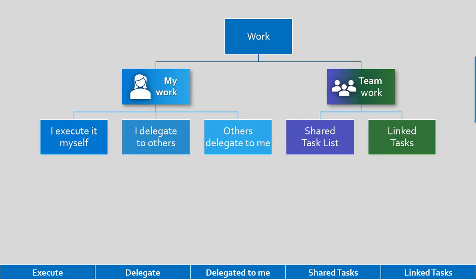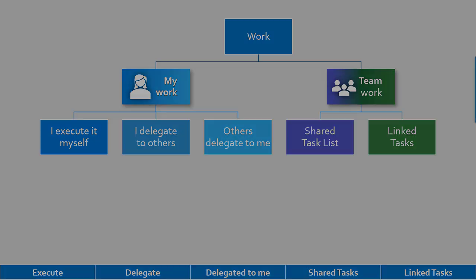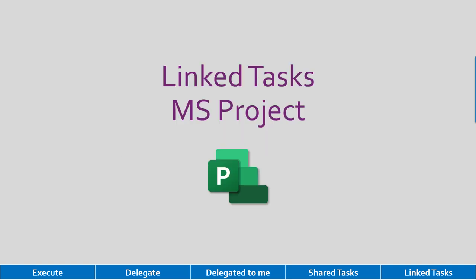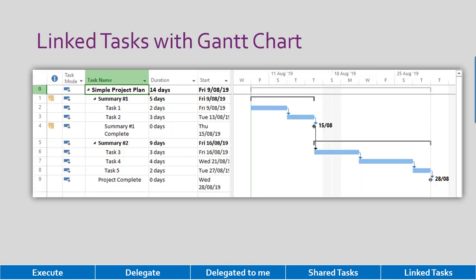And the final type of task which we have to worry about is linked tasks. These are typically large complex projects where tasks are not done in isolation. If a particular task is delayed, it affects other tasks. That kind of thing is best done in a project management tool like Microsoft Project. We have list of tasks, they are linked to each other, and it will also draw a nice Gantt chart.